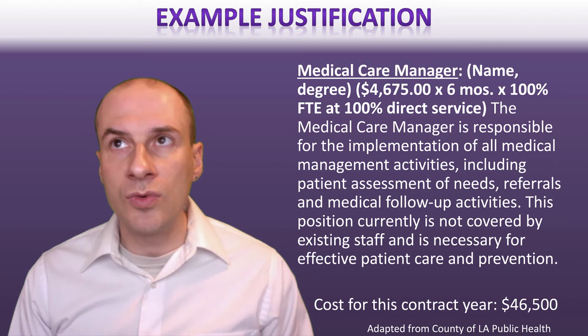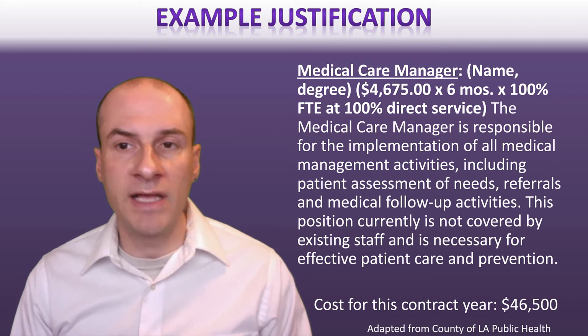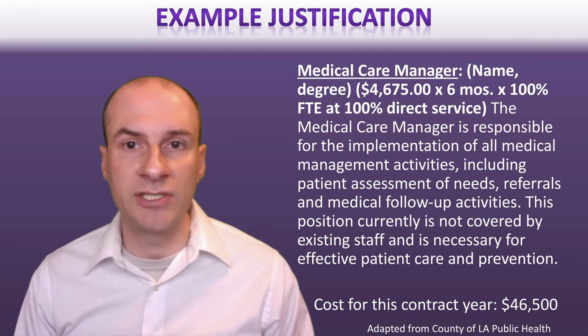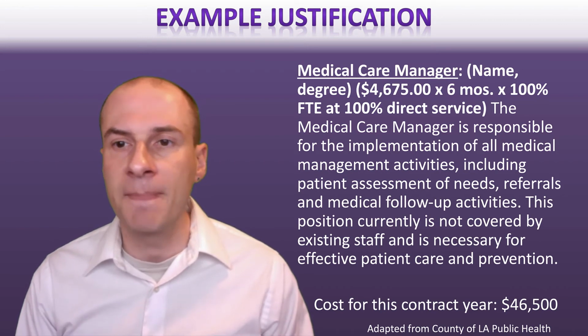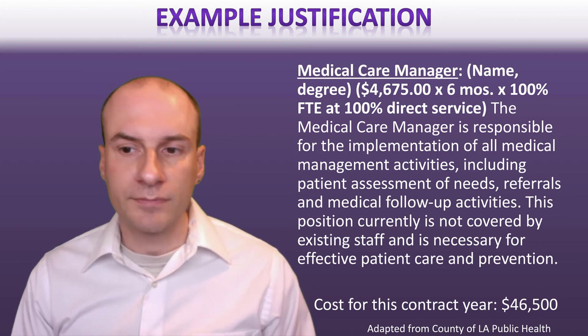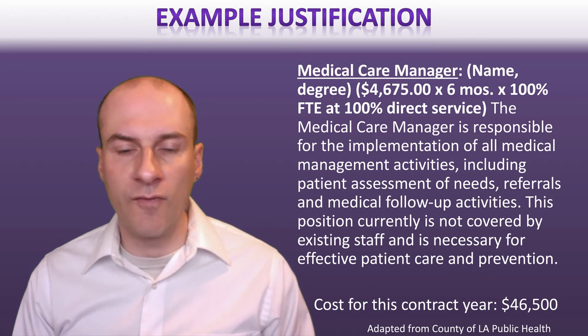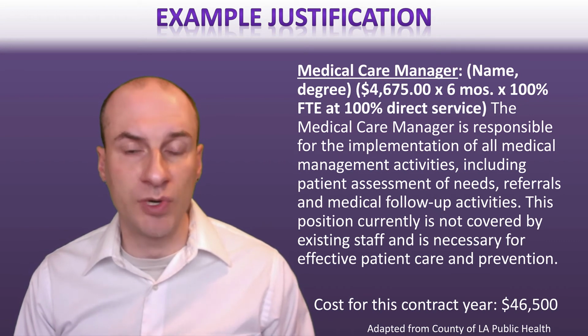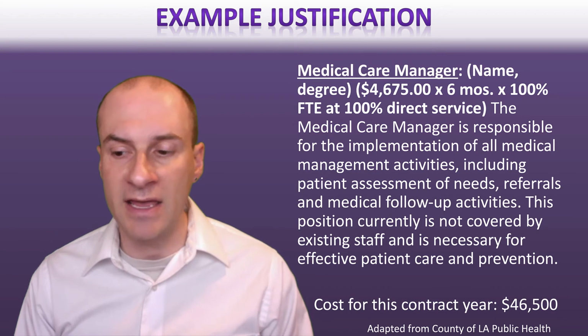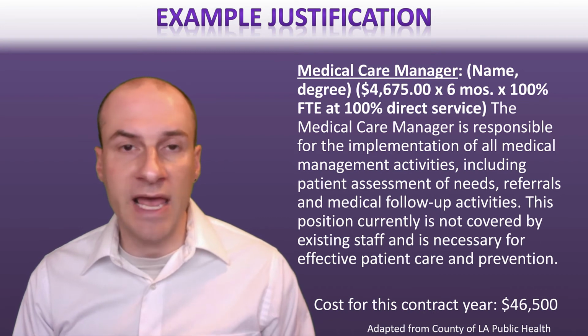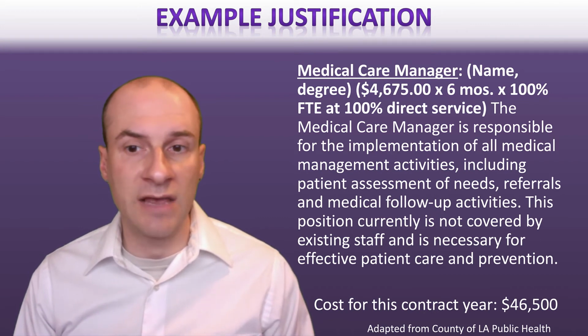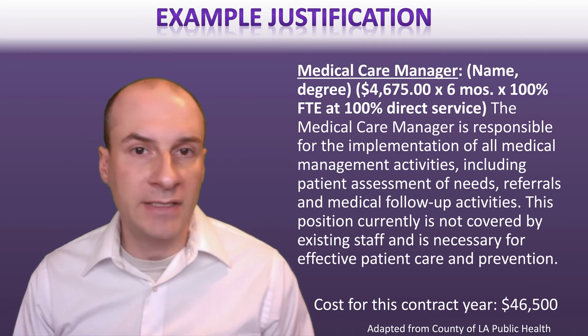Now, when you present a budget, it's often the case that they will ask for a budget justification, or expense justification. This is where, for key expenditures, or especially expensive, high cost expenditures, they are essentially asking you to say what is the thing that you're asking for and why are you asking for it.